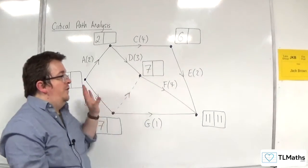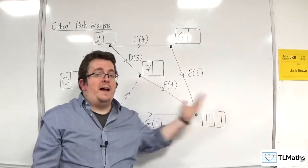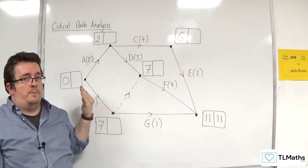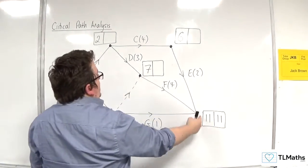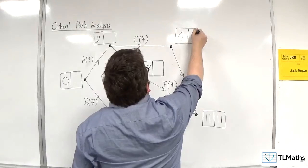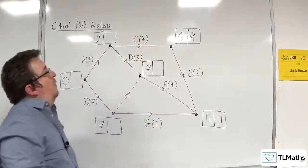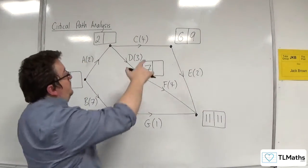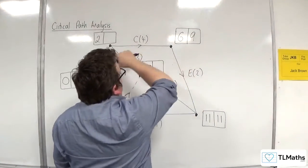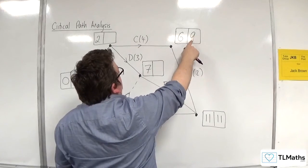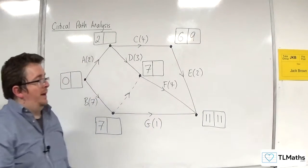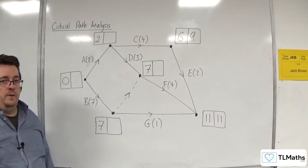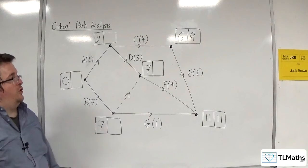So now I've done the forward pass. I'm now going to do the backward pass, filling in all the right-hand boxes. So we've got 11. Then take away two gets me to nine. So what that's telling me is that C could finish by nine at the latest in order for E to be completed in the time, without the whole project overrunning.